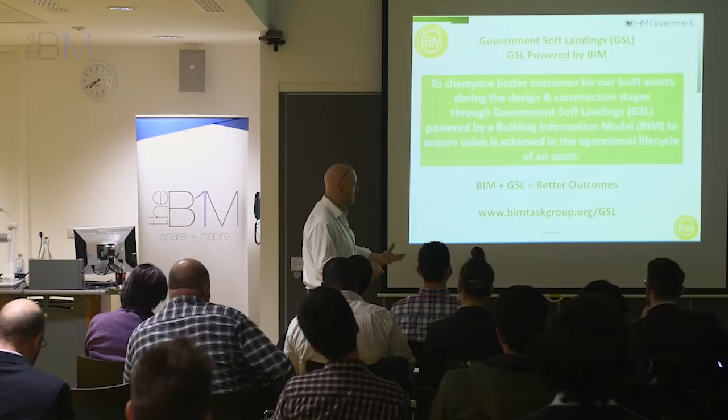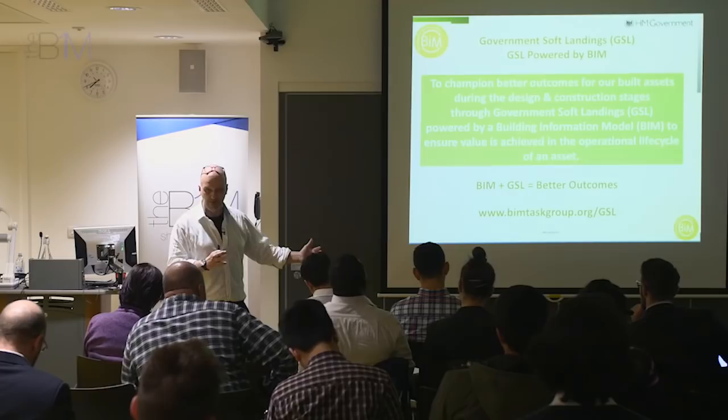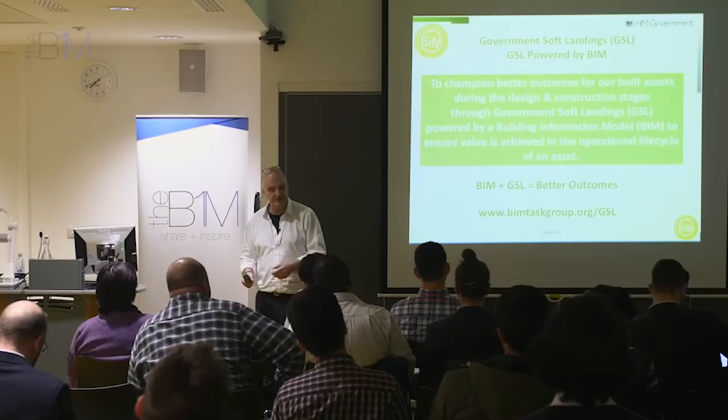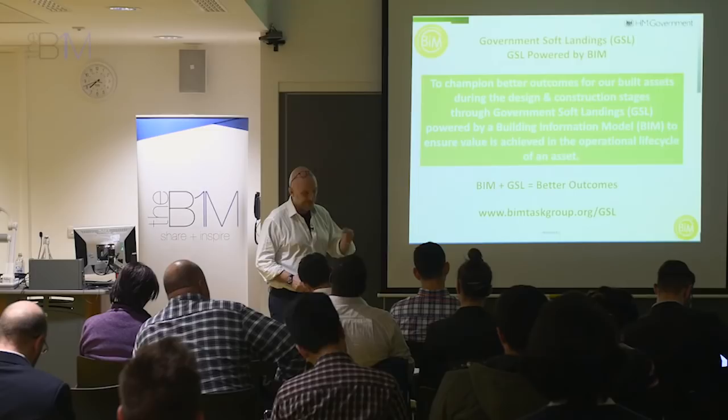But basically, soft landings is about having a good handover and commissioning, training and aftercare process. Because we do a lot of good work in the design and construction process, and very often it all goes to waste because we're not so good at handing buildings over to people, making sure that all the stuff works, they get the right keys, they've had the right training to use the building management system, all those sorts of things. And this is about Government Soft Landings, having a champion in place to ensure that this sort of stuff gets thought about early enough in the project to make a difference.